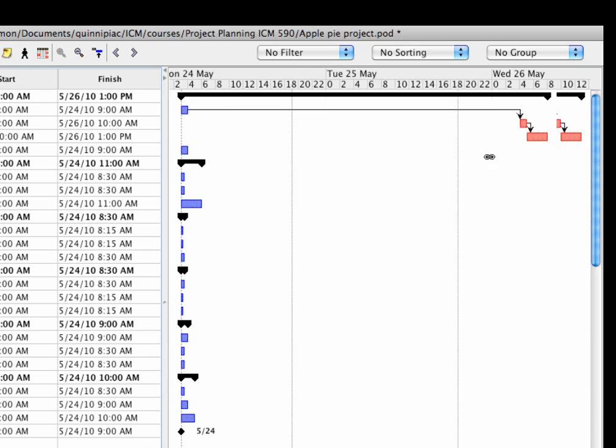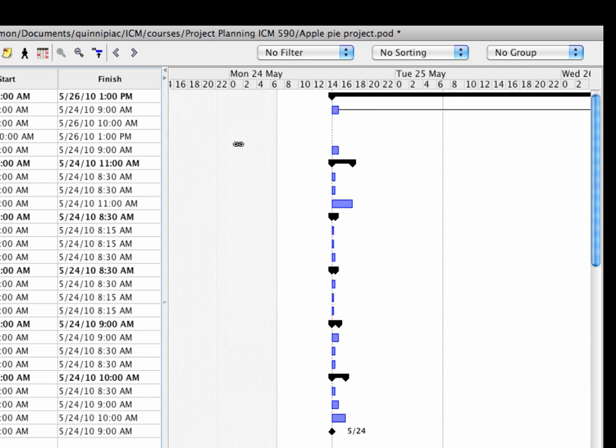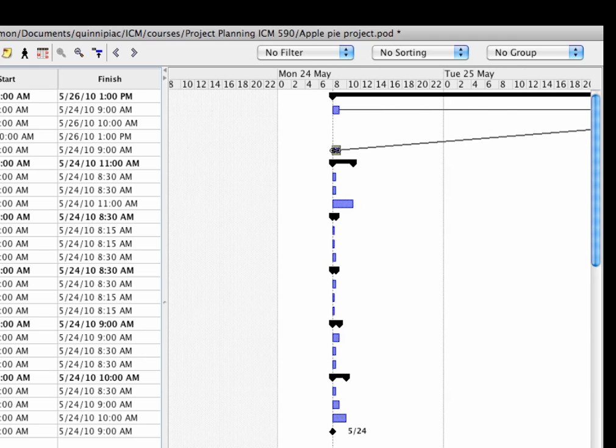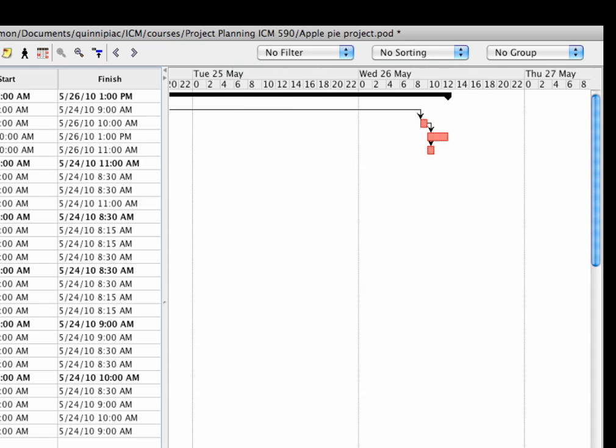So I'm going to drag a dependency line to this one to compare reviews, and then you see what happened is that it actually created a double dependency off one task. Select 3 menus, I'll get opinions and compare the reviews of them, and those essentially can happen simultaneously.